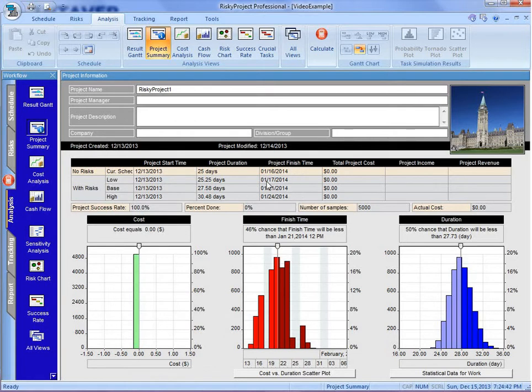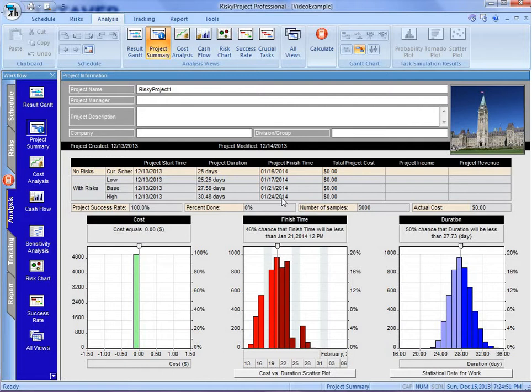We can finish on January 17th deterministically. The P50 or average, we're going to finish it on the 21st. And the pessimistic is going to finish on January 24th.